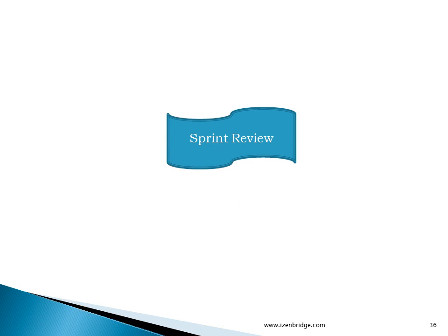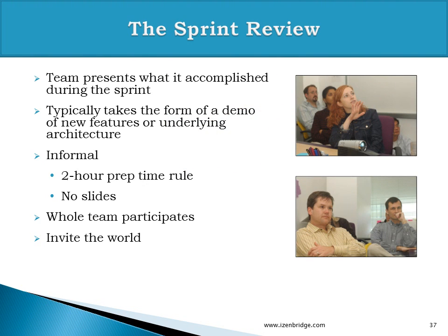The next sprint ceremony is the sprint review. It's the check part of that plan-do-check cycle. In the sprint review, the team presents what they have accomplished during the sprint. Typically it takes the form of a demo. They need to demonstrate the running software. We should not be using presentations for presenting the progress. The software should be presented as evidence of progress, because Agile believes in working software, and the whole team participates.